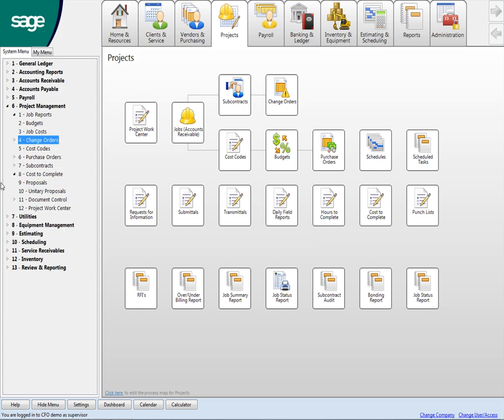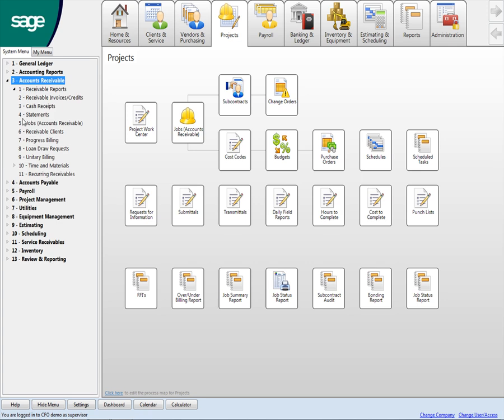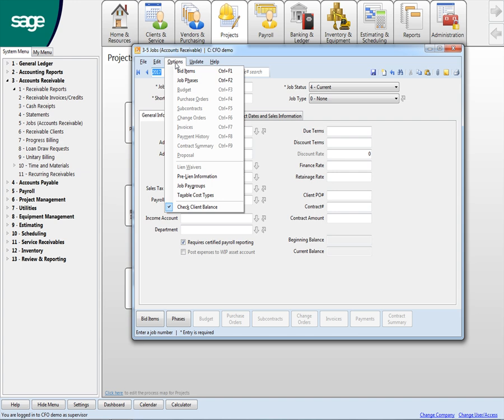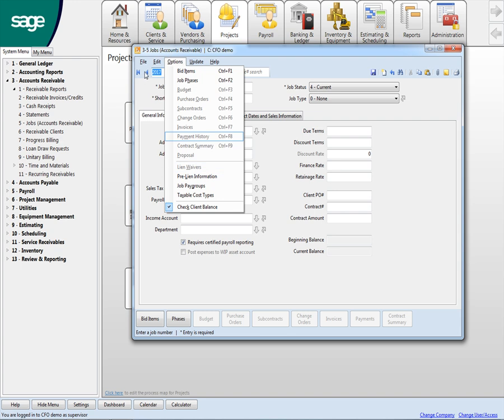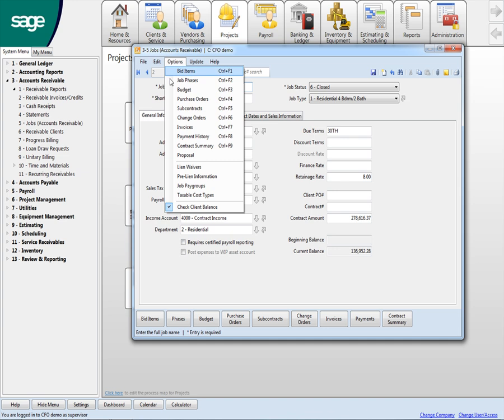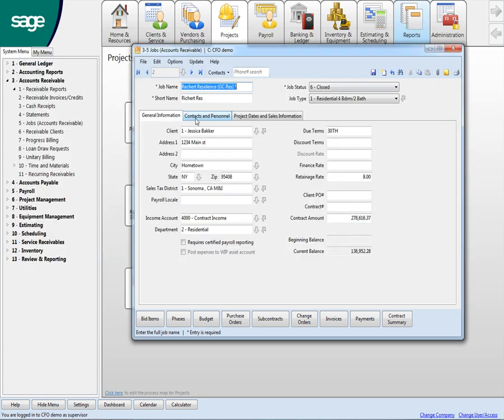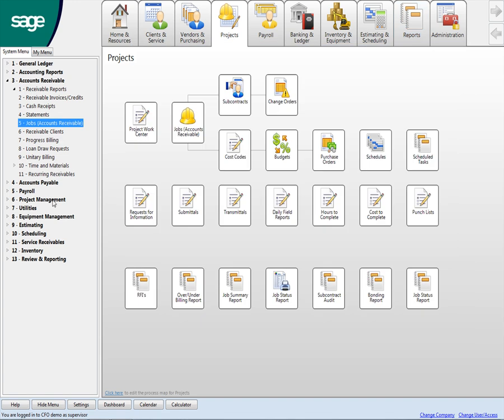One of the things that I had to make a phone call this morning. Let me get into a job real quick here. So we do do prelien information. We do lien waivers. That is part of it. Let me just find a job that has something here. So these are all the people that prelien the job, who the secondary vendor is, the dates that we tracked all that through. So that's all there.